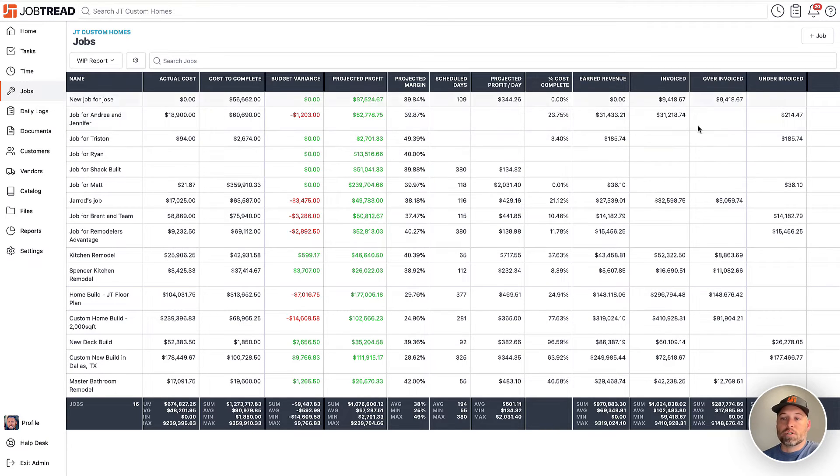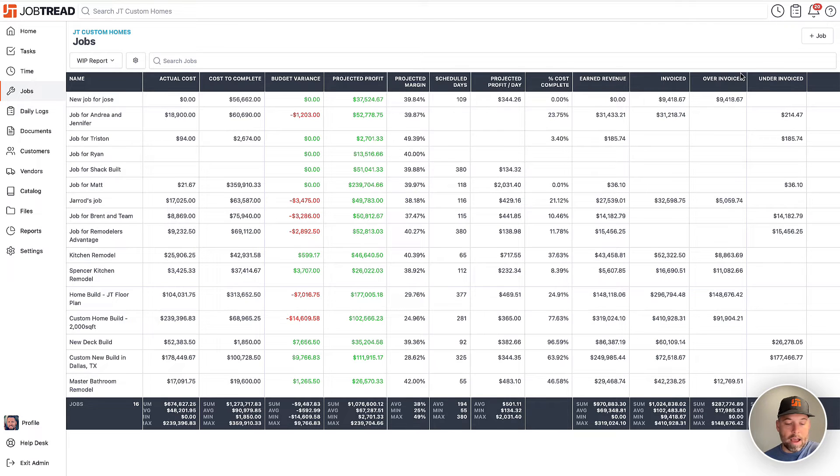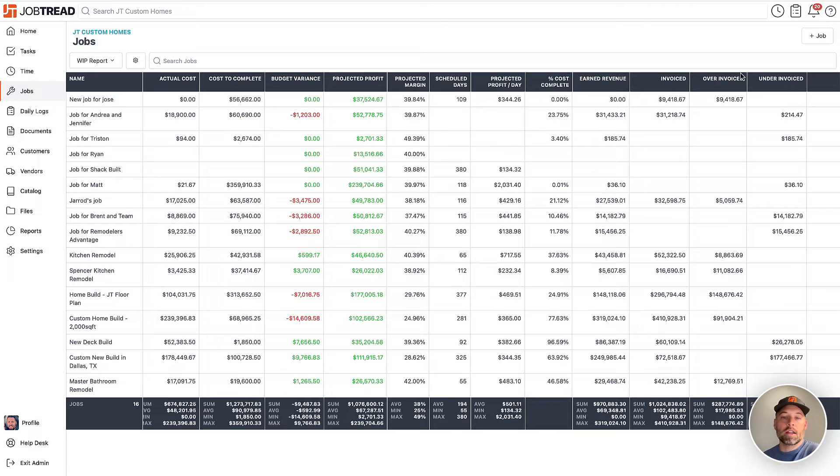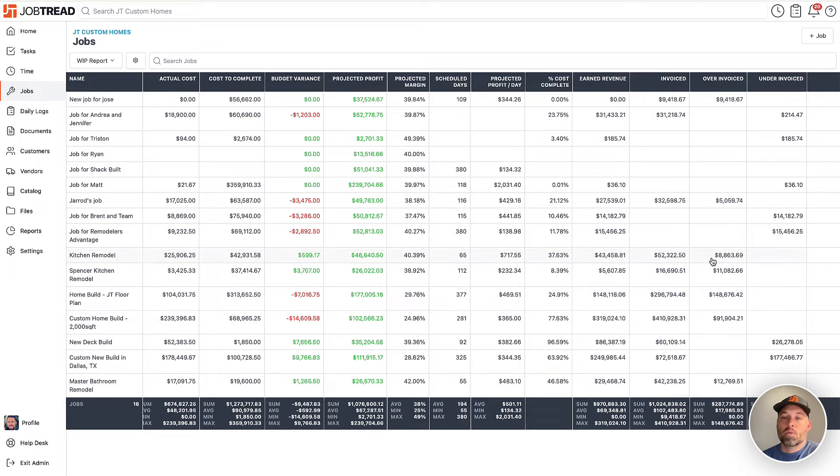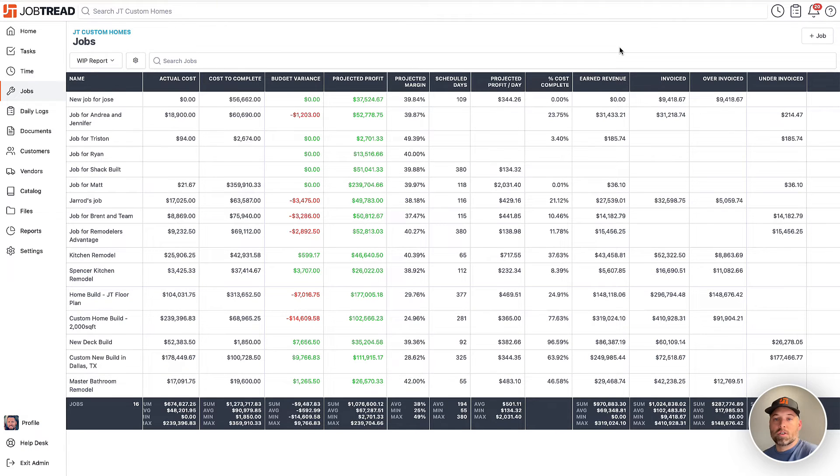But those numbers help you realize as a whole, as the company, how are we doing on this job? Are we invoicing in line with how we spent our money so far? At the bottom of all these columns, of course, you're going to see the summaries, which will show you in total across all these jobs, where are we at?